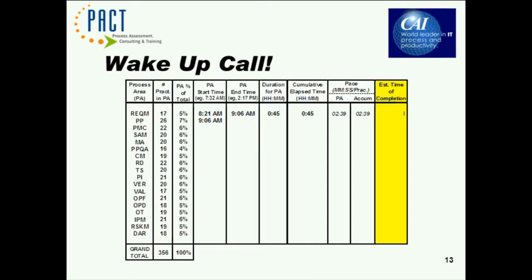The total expended to date for the whole day is 45 minutes, and we average 2 minutes and 39 seconds per practice. Now, if we multiply that times the grand total number of practices down in the lower left-hand corner of the slide, 356 practices that we have to cover in total, at 2 minutes and 39 seconds per practice, that's going to take us until just after midnight to finish up.